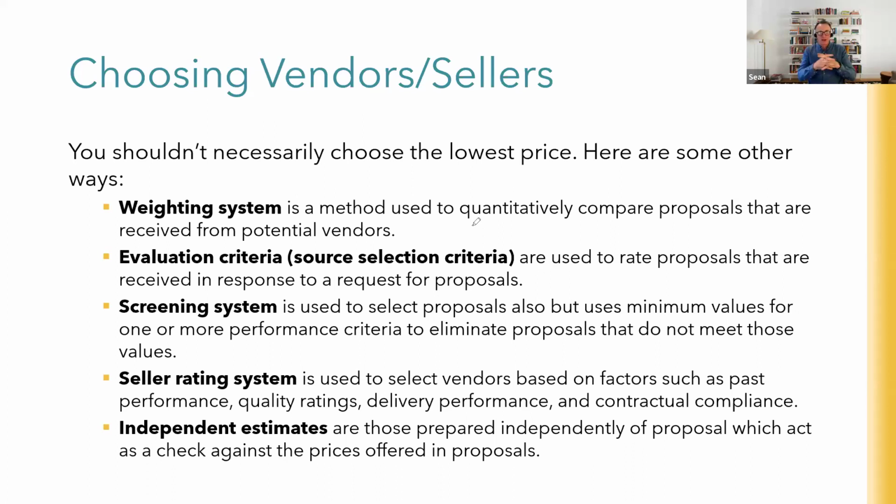There's one that I'm replying to at the moment where they've made it clear, I think it's 30% will be on price and 70% will be on non-price attributes. And they've published that out to everybody, so they can't change that. It's like, we know the scores: 30% is on price, 70% on non-price attributes as well. So you could have a weighting system to help you choose. Do take into account previous experience, references, and staff assigned.